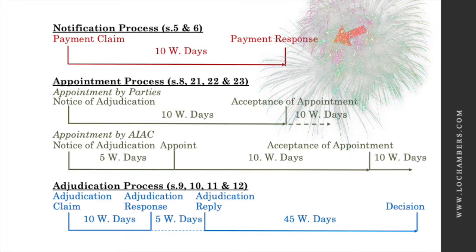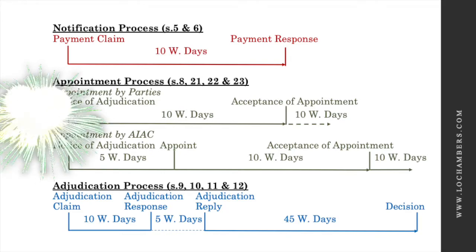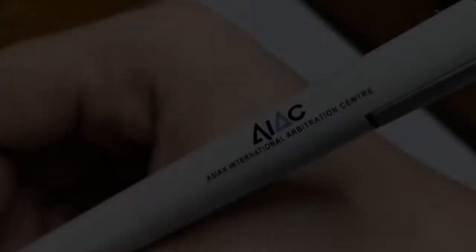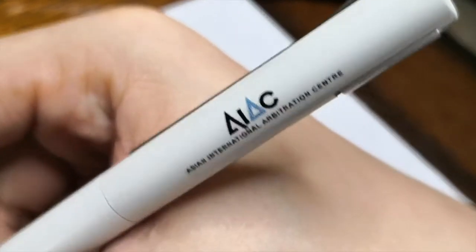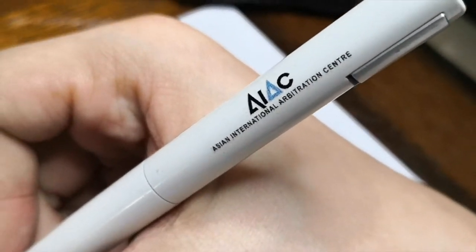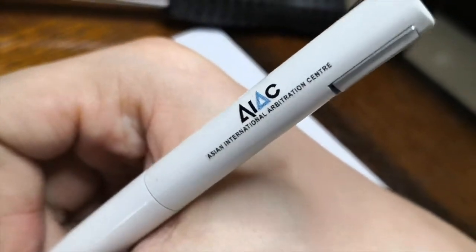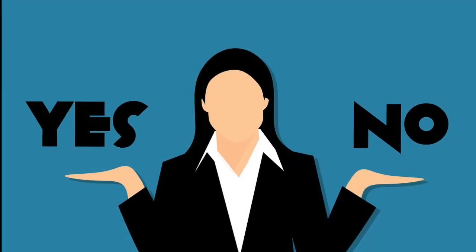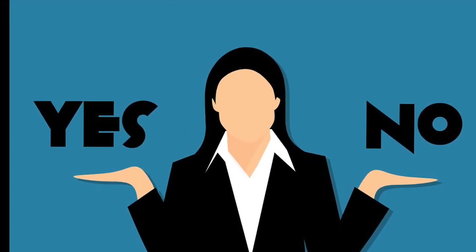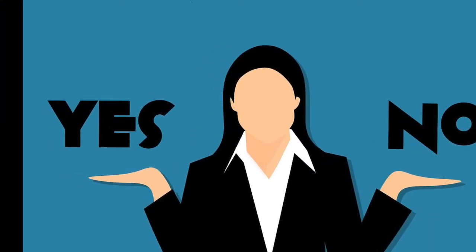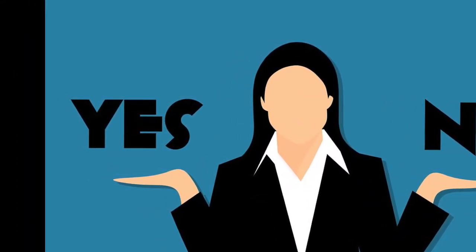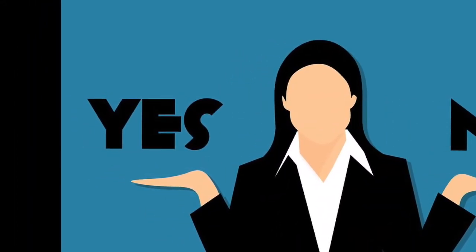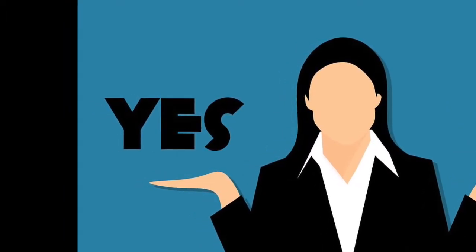Upon the expiry of the 10 days or once a response is provided, whichever is earlier, the parties can proceed to either agree to name and appoint an adjudicator to hear the matter, or request the AIAC — the Asian International Arbitration Centre — to appoint an independent adjudicator. Because the SIPA proceeding is prescribed under a statute, even if the non-paying party disagrees or chooses not to respond, the proceeding can still carry on. Hence, it is better not to ignore it.